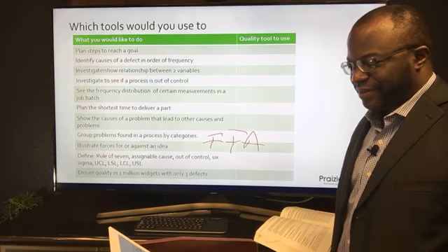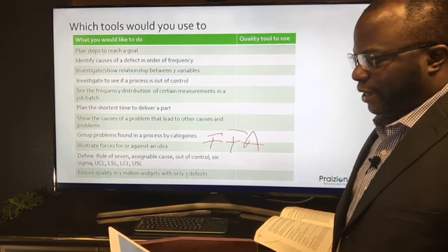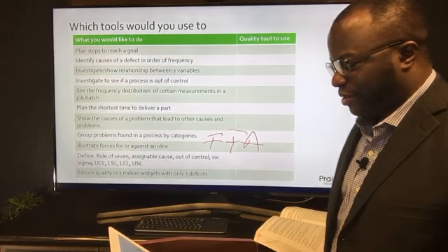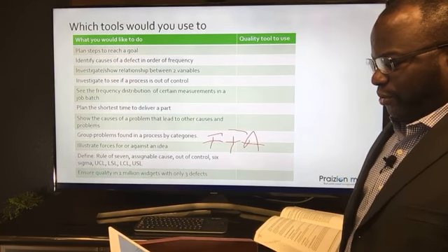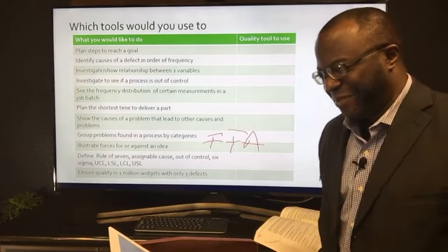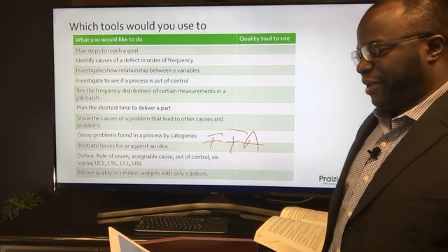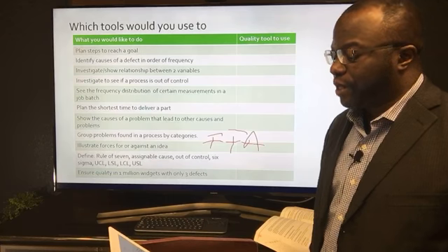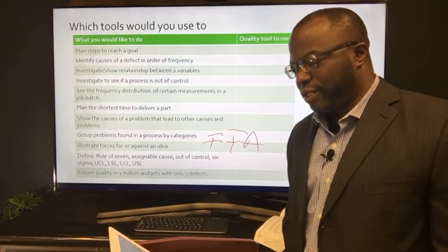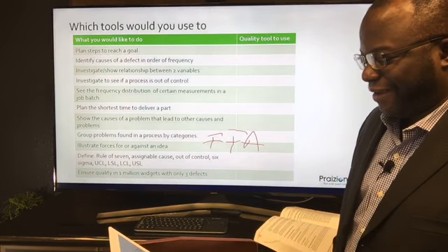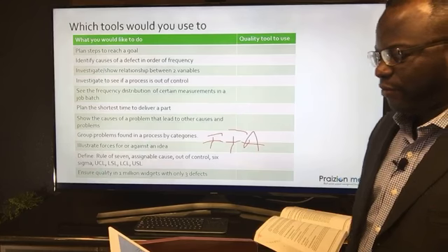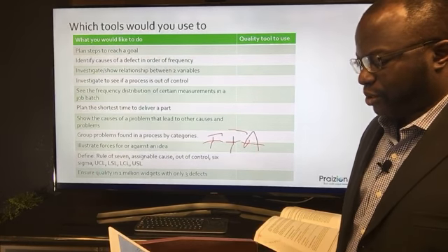Amjad, that is close. 99. Thank you, Achintia. That is exactly what I was looking for. If you wanted to go OCD on it, you could say 99.999666666. And Namdio, thank you. That is also a very correct metric. 3.4 defects. Think of Milli Vanilli, and not Billy as in Bill Gates. 3.4 defects per million. You got to think of the milli when it comes to this. We're dealing with a million opportunities. 3.4 defects per million opportunities.